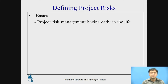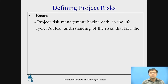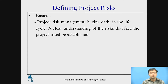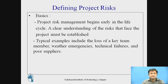Let us first understand the basics. Project risk management begins early in the life cycle. As we are all aware of the process — initiation, planning, execution, control, and finally the closure of the project. So project risk management begins in the early life cycle, starting from the initiation phase, and a clear understanding of the risks that face a project must be established. Typical examples include the loss of a key team member, weather emergencies, technical failures, and poor supplies.